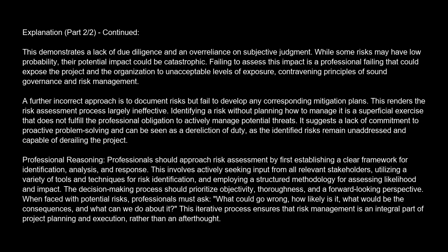When faced with potential risks, professionals must ask, what could go wrong? How likely is it? What would be the consequences? And what can we do about it? This iterative process ensures that risk management is an integral part of project planning and execution, rather than an afterthought.